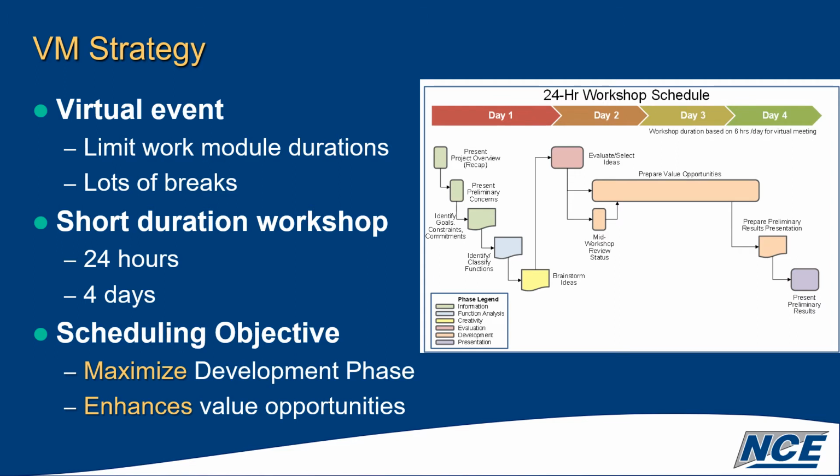So we're always looking at short duration workshops, but we're also looking at short day workshops as well. In this particular case, we used 4 6-hour days with quite a few breaks to help people operate through here. Our objective for scheduling was to maximize the amount of development time.